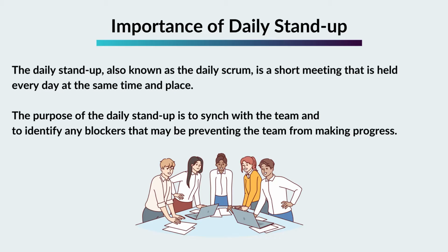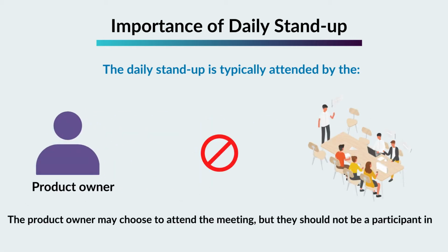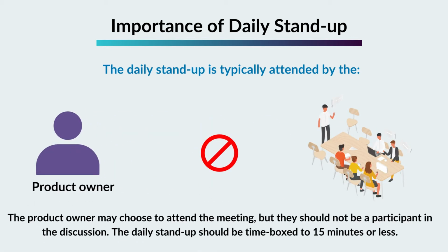The daily stand-up is typically attended by the Scrum Master, developers, product owner. The product owner may choose to attend the meeting, but they should not be a participant in the discussion. The daily stand-up should be time-boxed to 15 minutes or less.